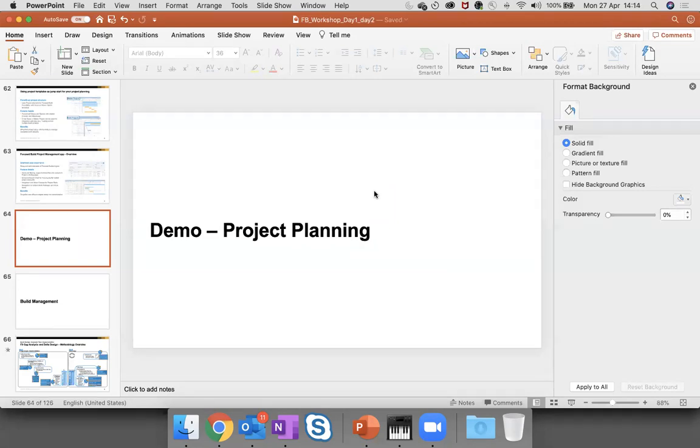How do we centrally manage or view all project resources from multiple build projects? Resources are aggregated in the master project. So you could see all the resources in the master project if you have build projects which are rolled up into the master project. I think that was also the next question: can we import MPP? Yes, there is a one-time import of an MPP into C projects. That's possible, but there is no synchronization between the two.